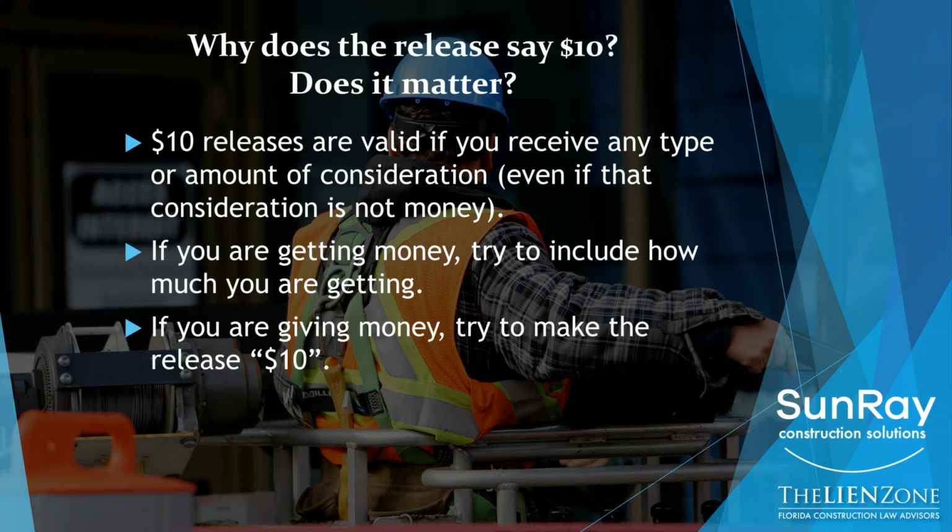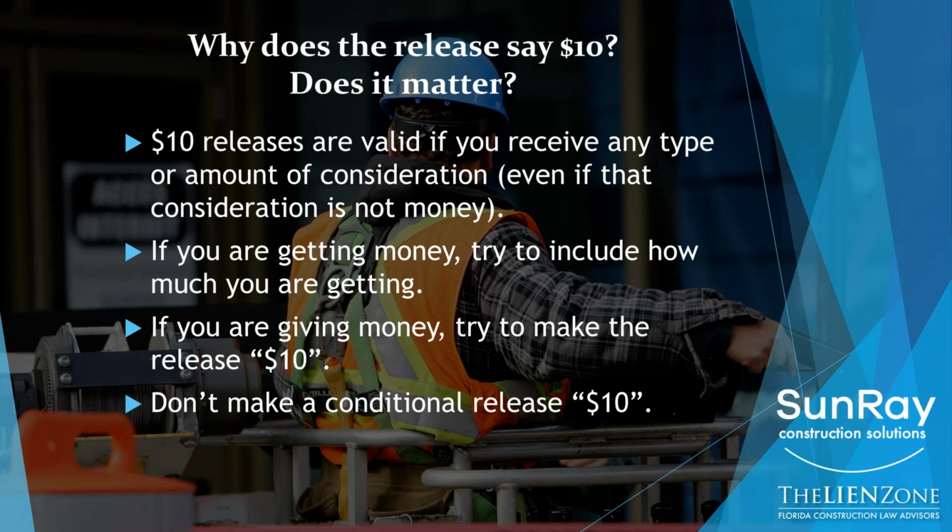If you're giving money to somebody and getting a release, it's always better to try to get that release to say $10, because then you don't have to worry about someone coming back saying, well, I gave you this release and I was expecting $25,000 and you only gave me $20. Those arguments go away when the release says $10. And of course, you cannot make a release conditioned on $10. So if you're going to have a conditional release, it has to be conditioned on actually the amount of money that you're expecting during that period of time.